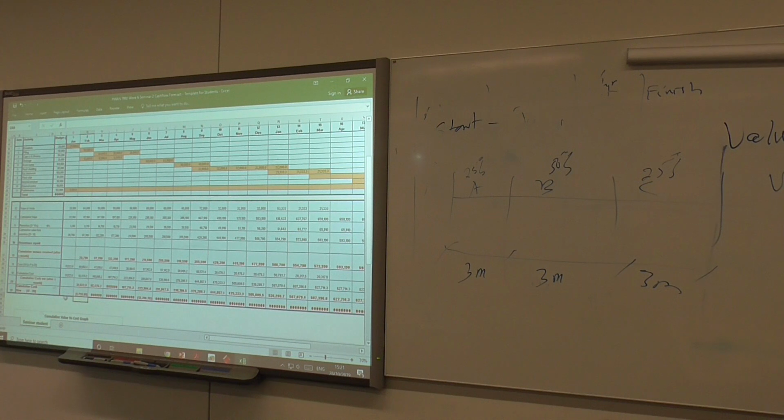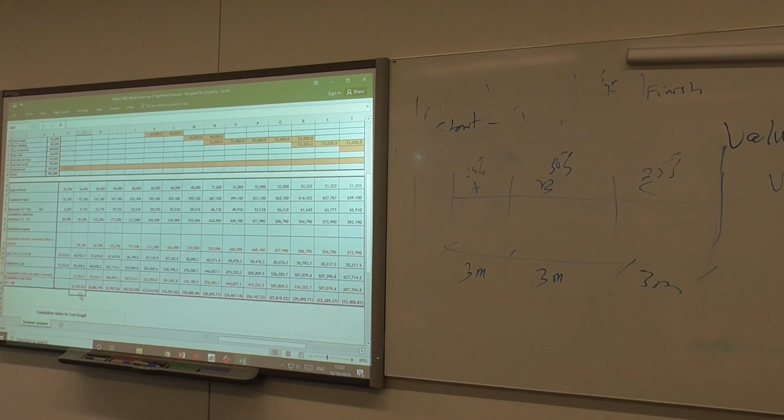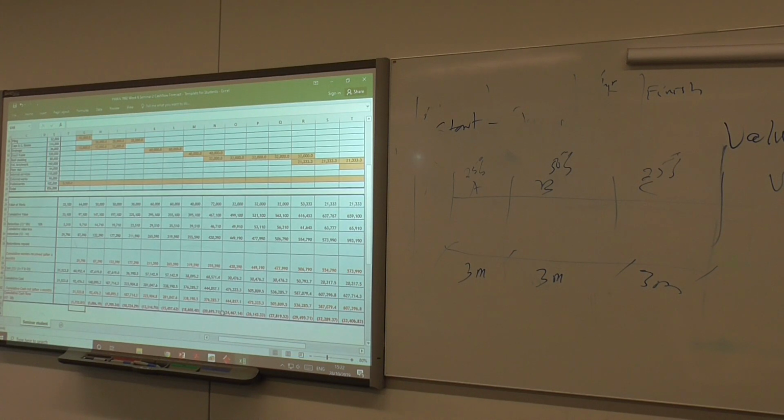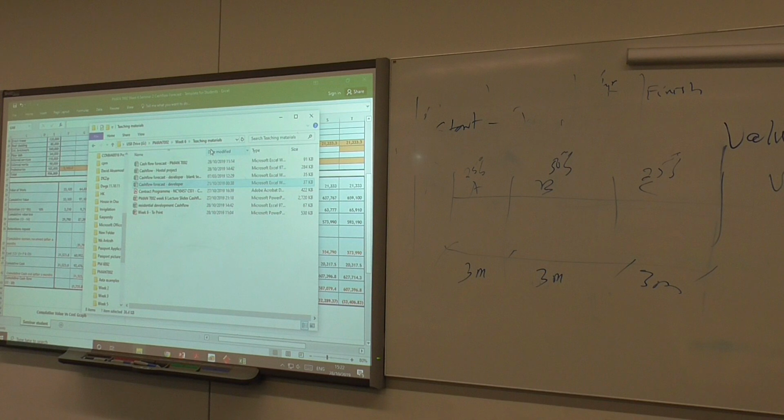To do that, we calculate the cumulative cash out, or the actual cash flow, which is the cash in minus what? The cash out. So this is what happens here. You have your cash in. You realize that for every month, right from January, I mean, we've not completed it, but this shows you that at every point in time, the contractor will be in some sort of negative or deficit, because the contractor is basically financing it.